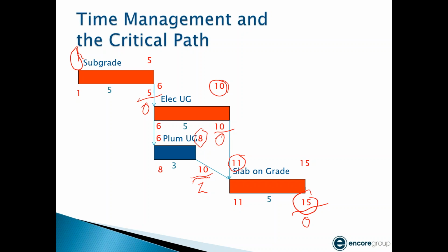I call my critical path schedule my slush fund for time. I can tell if a project's being delayed, or if an activity or a task is being delayed. I can tell how many days I have before it's actually going to impact the end date, or I can tell if it's already impacting the end date, just based on the float values of the task. So understanding that critical path is kind of a good introduction into what you want to look at.